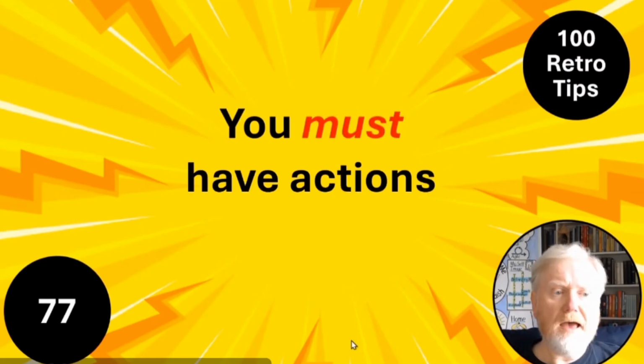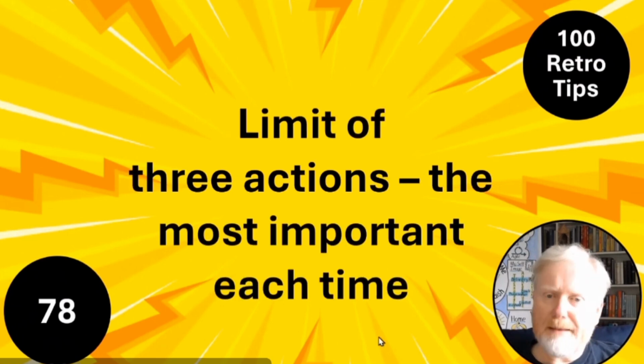I'll click. You must have actions. I talked about actions, not venting. Otherwise, there won't be any change. Limit it to 3 actions, the 3 most important things as decided by the team. If you try and do loads, you're never going to be able to do loads.